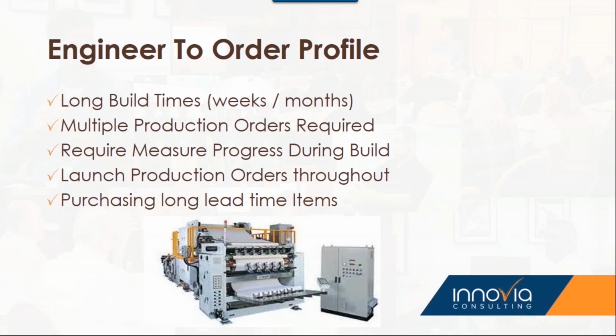So I need to launch. I can't wait till every drawing is done. Even if you only had like 400 drawings or 300 or even 30, you can't wait. You have to start. You have to machine the material. Get to it and let purchasing know they've got to order it as soon as you can, and you've got potentially longer lead times. Next slide, Angie.